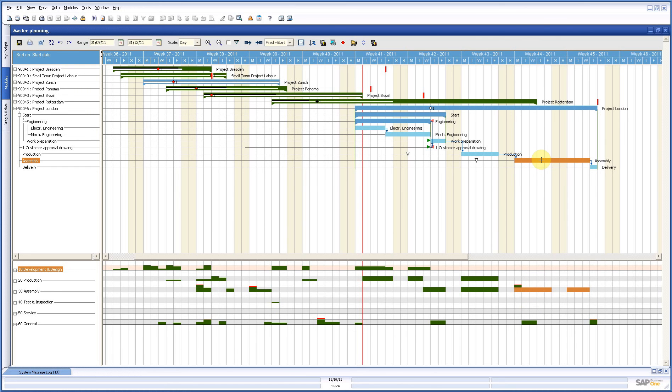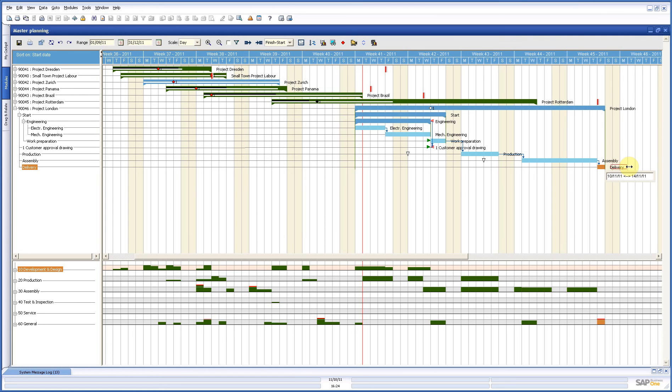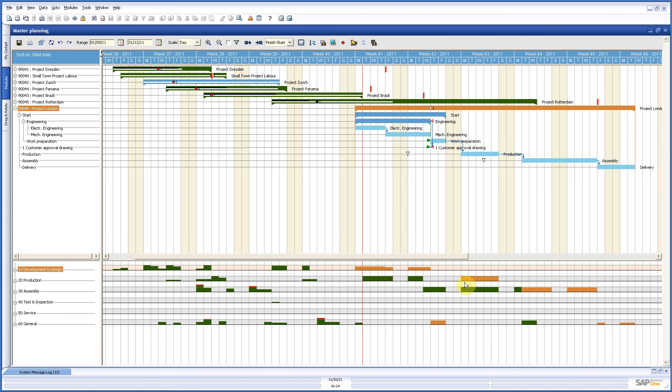Now it fits, but we see that there is still something left from another project. And here with my delivery, I have to do the same, just make it a little longer. And if I have a look now, I see here that no red lines on this project, so this is planned very well for my resource or capacity needs.